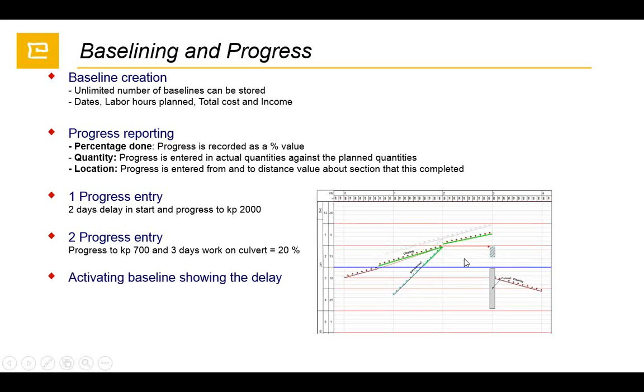When we compare with the baseline in the background, in the blue color, this is the baseline task. In the annotations, we can represent the data from the baseline. So we can have unlimited baselines. We can display our comparison baseline, one baseline, and with the remaining part, so we can have a clear understanding of the works: when it was planned, where it was planned, and how it is going to happen. With annotations, we can display performance index values as well.